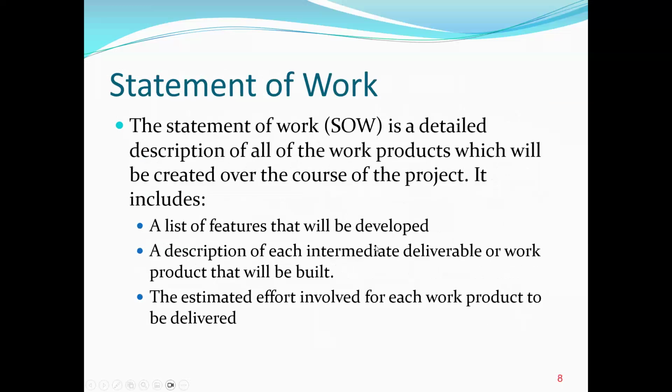So next is a statement of work. This will be a detailed description of all of the work products which will be created over the course of the project. Also, it includes a list of features that will be developed, a description of each intermediate deliverable or work breakdown that will be built, and the estimated effort involved for each work product to be delivered.